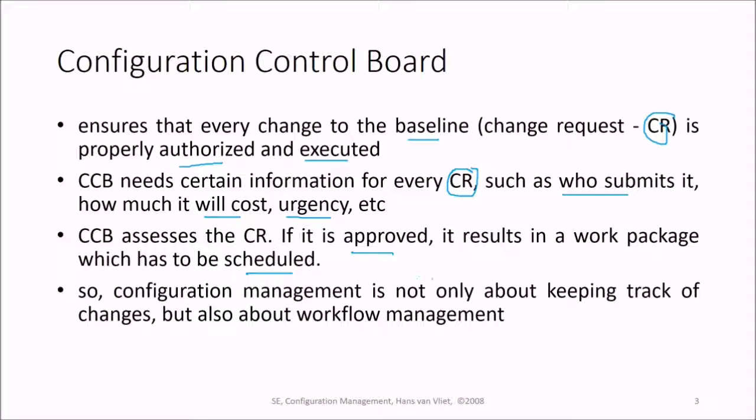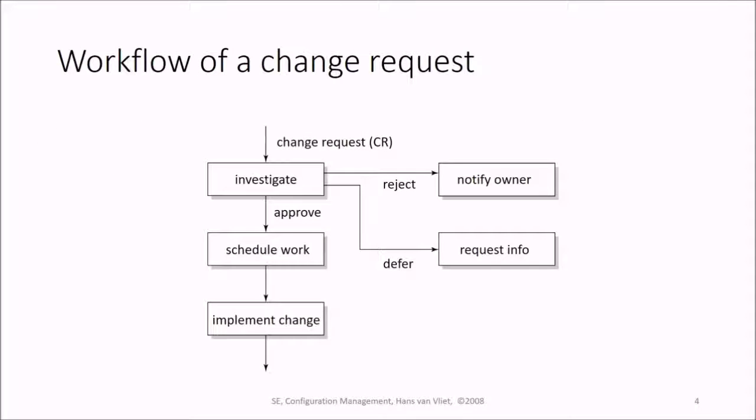So configuration management is not only about keeping track of the changes, but also about workflow management. This is important. This is the workflow of a change request. Say somebody submits the change request. It will be properly investigated first. Investigation will be done, and first of all we have to notify the owner. We can defer it or request info, and if it is approved, we need to schedule the work, and then whatever change is required, we need to implement the change also.